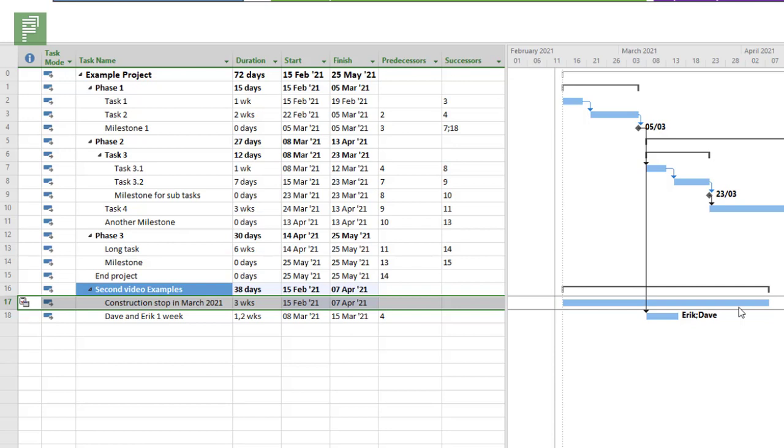Another example can be related to resources with different work schedules. On a schedule for a person that works part-time, you wouldn't expect to have that person doing the work during a workday where he actually doesn't work, right? So if you have a schedule and you have a task and you put 2 resources on them and one of them is actually a part-time resource, you don't want to get him overworked or have the budget overrun because he's doing work that he's actually not supposed to do.